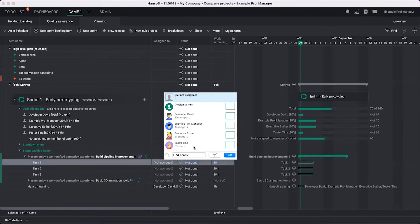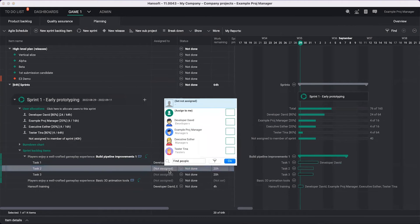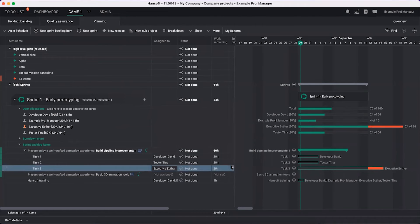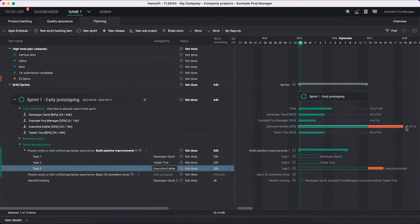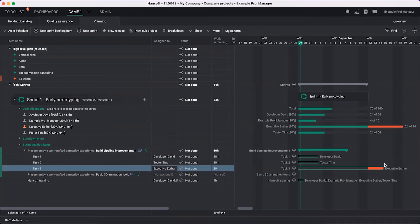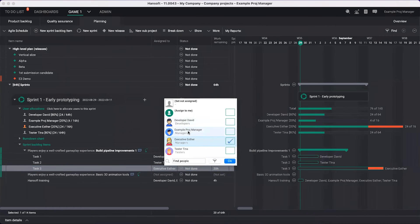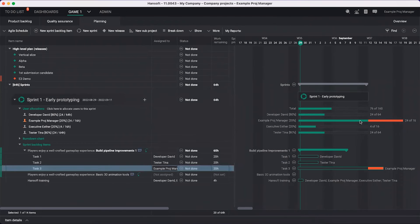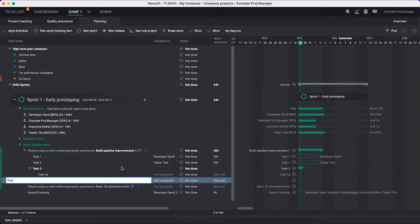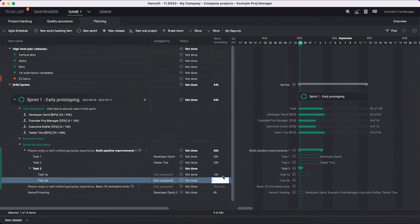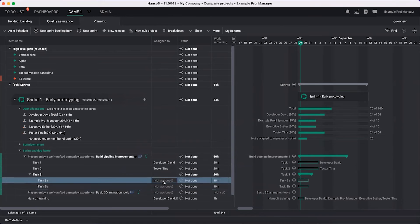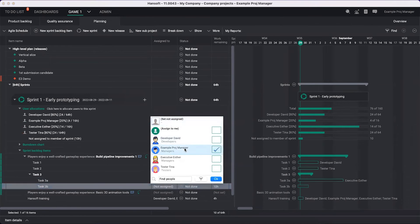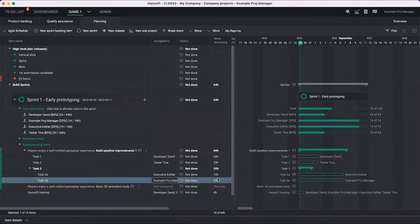The team may have two different ways of working here. One is that people pick up work as they go. The other one is that you pre-assign during your sprint planning and say David is going to work on this. We're going to have Tester Tina work on this. And then Executive Esther working on this. Now we triggered a little bit of a problem - Executive Esther now has 24 hours of work in the sprint, which is going to be a little bit too much based on her capacity. We'll get notified on task three - you're probably going to spill over, and Executive Esther is the person where it's going to spill over. Maybe this is an approval task. We need to break this down into task 3A and task 3B. We're going to split it up half and half, and assign that out to Executive Esther and example project manager.